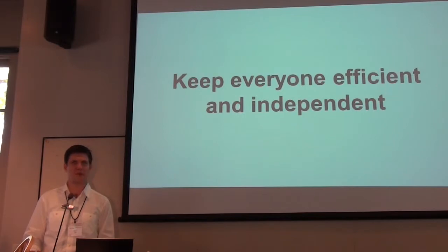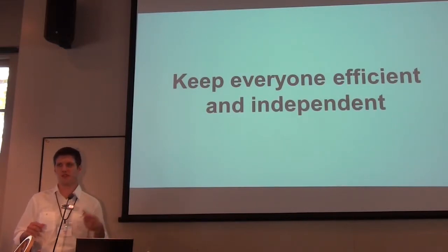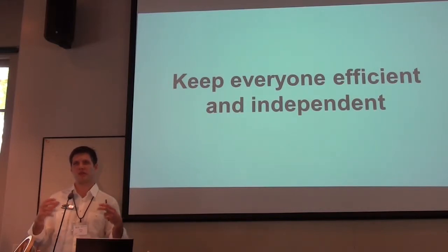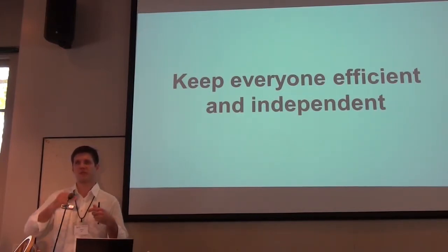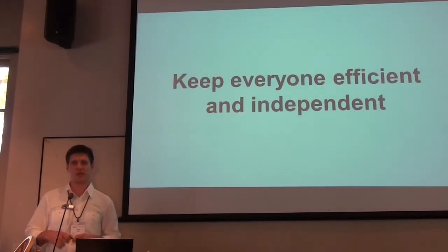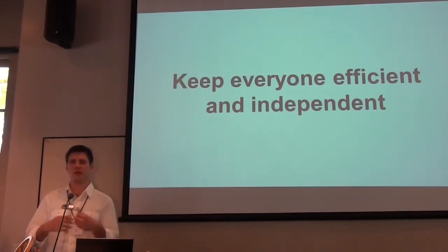Keep everyone efficient and independent. So that's the same kind of concept that applies to the whole project, that really helped us be really flexible. It also applies to individuals. So being iterative for individuals is also really important. Something we realized is that if you decouple people as much as possible and you allow them to iterate on their work by themselves, and you remove all the roadblocks from them, then the creativity output that you'll get from them is exponential. And one way we did this is we invested a lot of our time in creating good tools so that the developers and the game designers were really able to work without being blocked on each other.